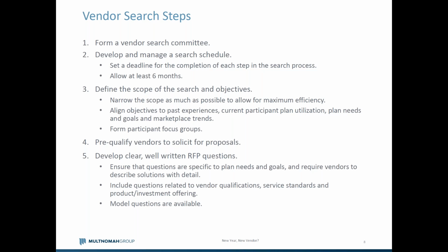But one of the things I think is really important is that you don't just rely on the industry standard questionnaires, whether it's provided by the consultant or there's a group out there called the Spark Institute that publishes a template RFP, but that you develop some very custom questions about your specific engagement. So if you have objectives around one certain area, be sure to include questions that very specifically articulate how a vendor is going to meet those objectives, because a lot of the industry standard questions end up with industry standard responses rather than responses that are tailored very specifically for your plan, for your engagement, and the issues that you have there.